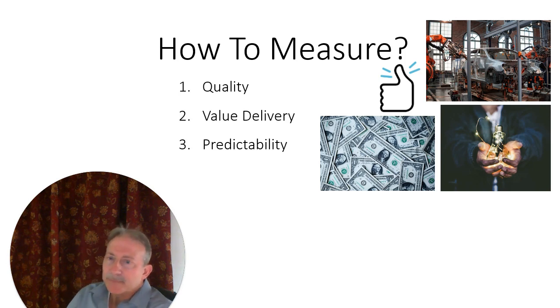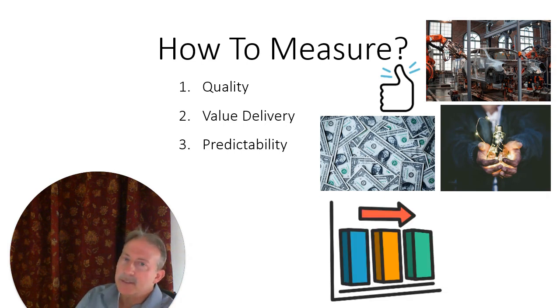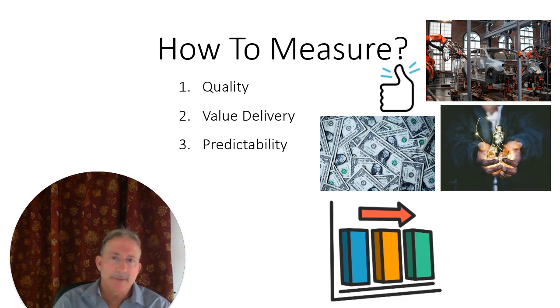And then predictability. So basically, we know Susie on the hamster wheel doesn't work, but how about Susie getting to done sprint after sprint? And then Susie helping her teammates, and so as a team, together, collectively getting to done sprint after sprint. Now you have a track record. You have stories committed, stories done. Features committed, features done. Now the business can look at that and say, wow, we can start having a delivery plan, or we can start having an opportunity roadmap and actually start seeing how it's going to play out in the future, and do what-if scenarios, and do planning, do forecasting based on this predictable team.